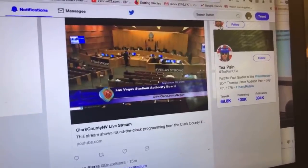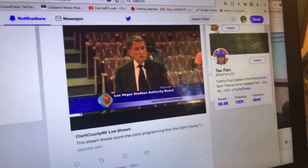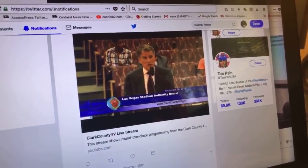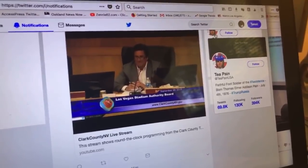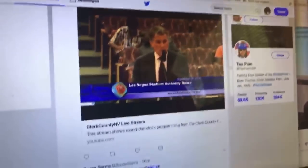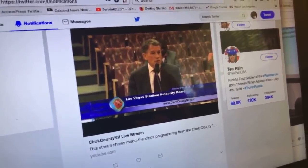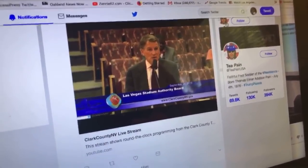Yeah, I do have one question on 8. Okay. Overall labor, ability to get, attract, keep? So far, it's not been a problem. Could be down the road, and we're monitoring a couple of specific trades, which I'd rather not go into in a public session. But it helps that the design builder is self-performing the concrete, and that's, as I've indicated, not just on the critical path, it is the critical path at the moment. So they're not reliant on a lot of subcontractor labor force issues that may come up. The steel is not a problem in terms of local labor force. And we think we're ahead of the wave in terms of some of the other projects competing for the labor pool where it might be tight. So we don't anticipate a problem, but it is obviously something in a buoyant construction market like this that we have to keep an eye on.